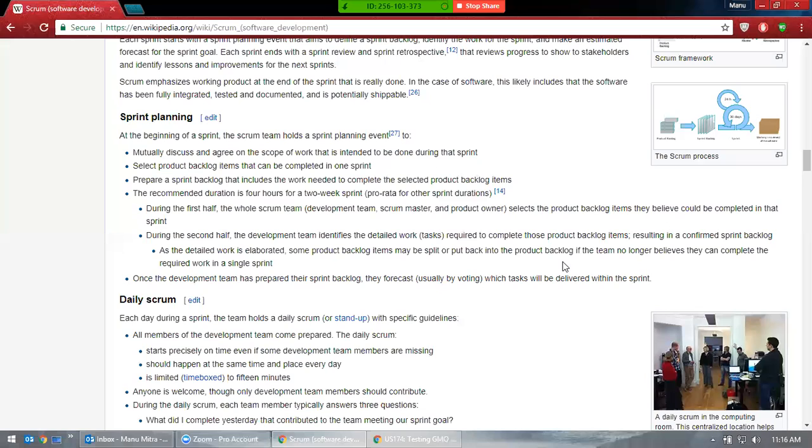So now what happens? Scrum Master says, no, we don't have 5 days time for this user story. This is very simple. Just make it 2. Now 2 days is really not required. And the developer says, let's say the dev lead says that no, really we require this 5 days because of coordination issue, and we need to talk to a lot of other people because this is not done before, and there's a lot of Java development to be done. So we cannot have 2 days of time. Then Scrum Master will agree. Okay, 5 days. That means 3 days for development, 2 days for testing.